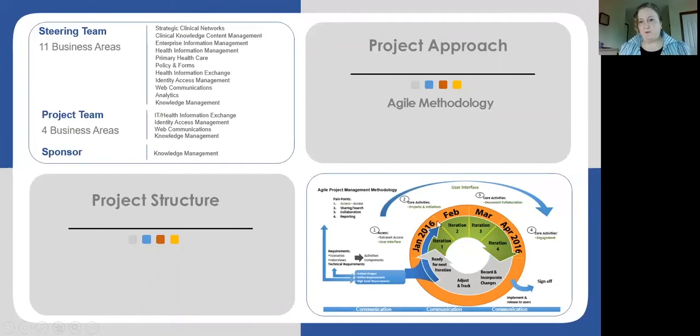So for example, first time we built the engagement tools in this particular case, user interface and access. Then we built the process for the projects. So it was this approach that we took. So you had an accepted product for every part of the bigger product.